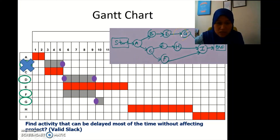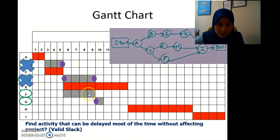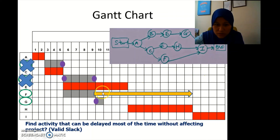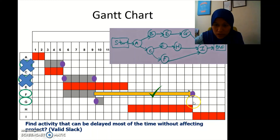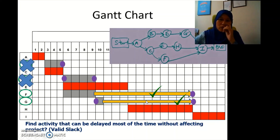We look at F — after F it goes to I. When we check the Gantt chart, there's a long gap between where F ends and where I starts, so F is a valid slack. Then for G — G also goes to I, and there's also a gap before I starts, so G is also a valid slack.